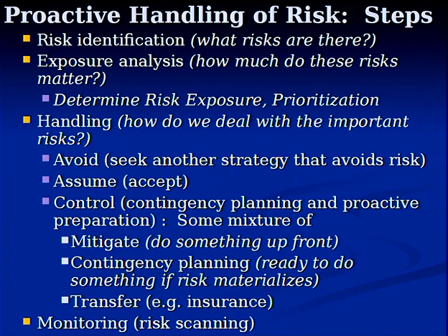You accept that the risk may happen, but you have in place a quick strategy. Well, I'm going to say quick. You have in place a strategy you've identified ahead of time that everyone agrees on, so that if the risk looks like it's going to materialize, you kick that strategy into action. You can act on it immediately without casting around and trying to coordinate and get a hold of the project lead. Instead, you act on it right away. Okay. So contingency planning is something that can really help you. If the risk materializes, it can help minimize the damage in that case.